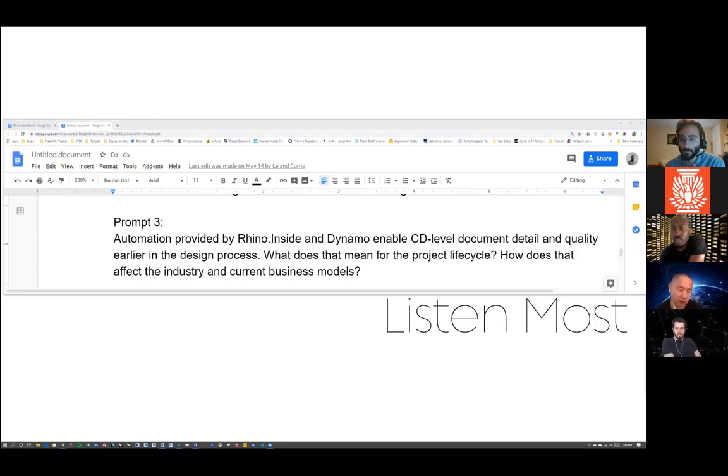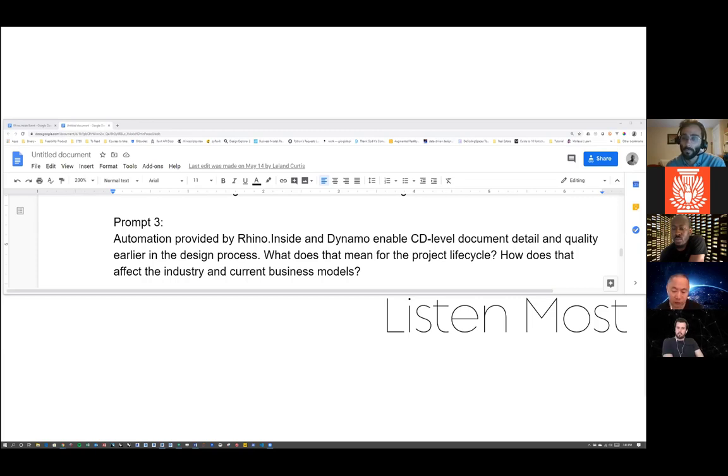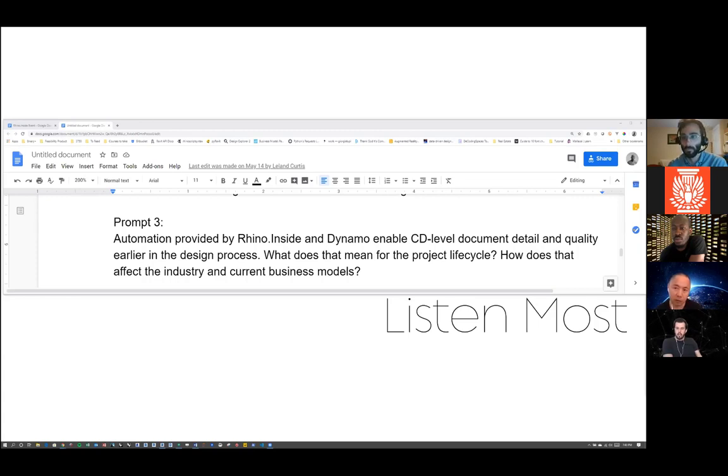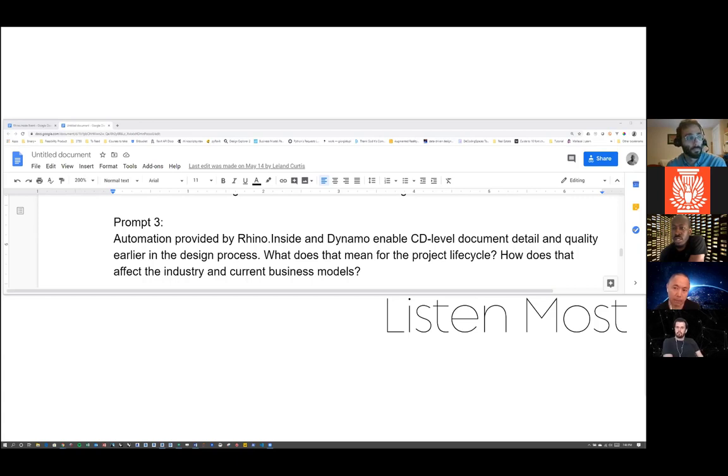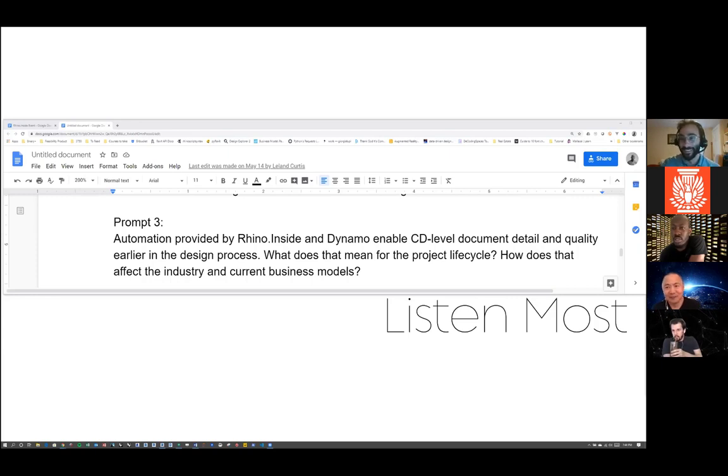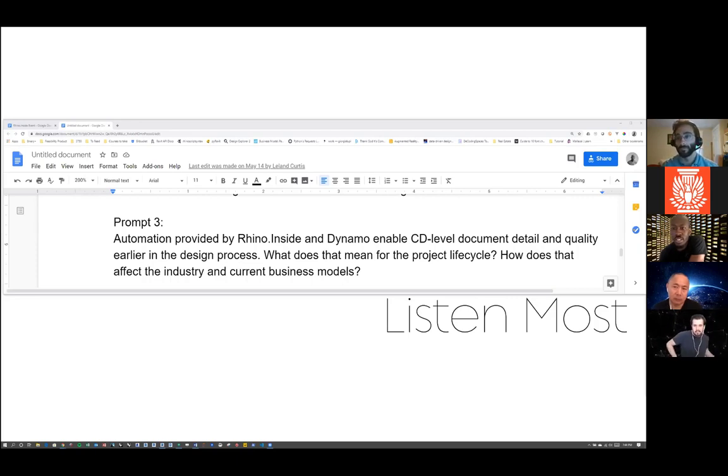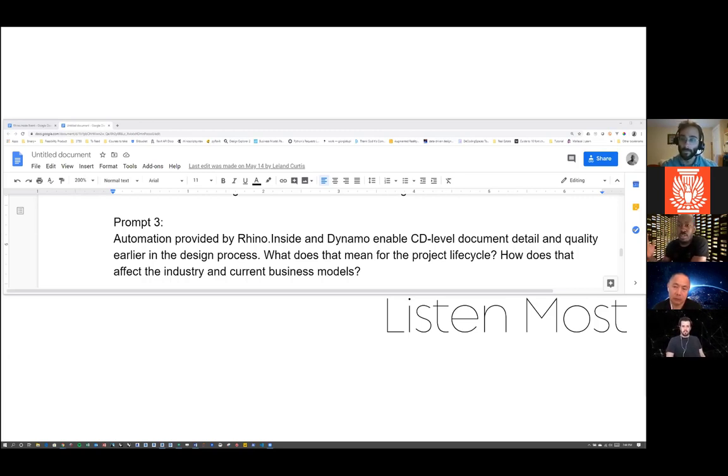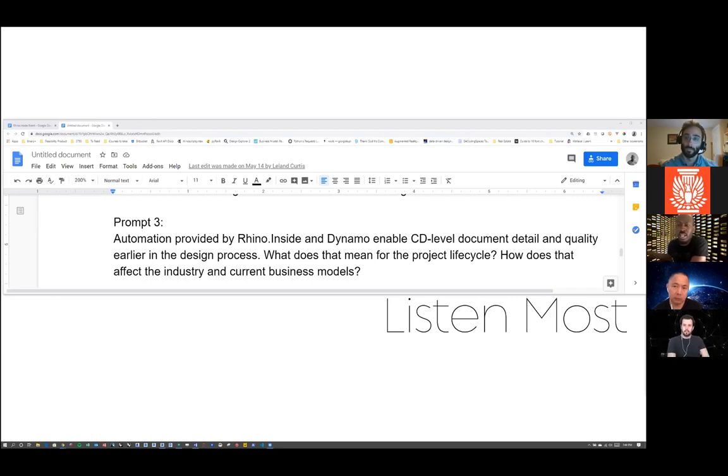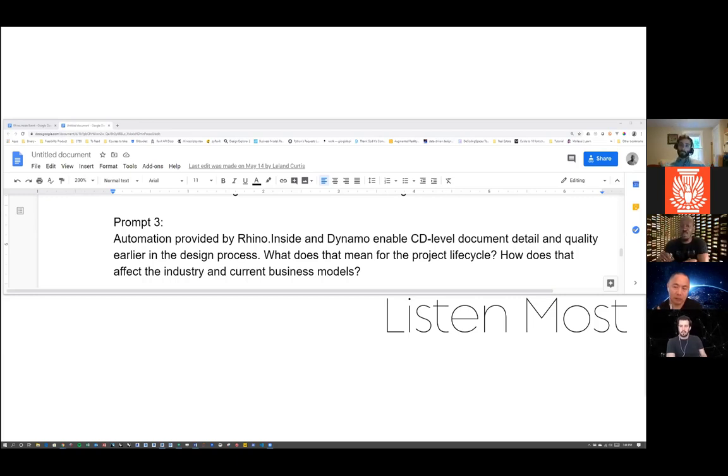It's almost per project. I think per project because it's based on contract when you write up the contract on who's providing what and at what format. One of the things we typically do is we want everybody to be on BIM. We want everybody to be on Revit. We want them to be on version at least 2019. Those are things stipulated in the contract. And if you vary from that, you have to rewrite the contract or make an agreement on who's providing what. I know the idea of IFC files was introduced trying to get everyone to rally around it, but it never caught steam.